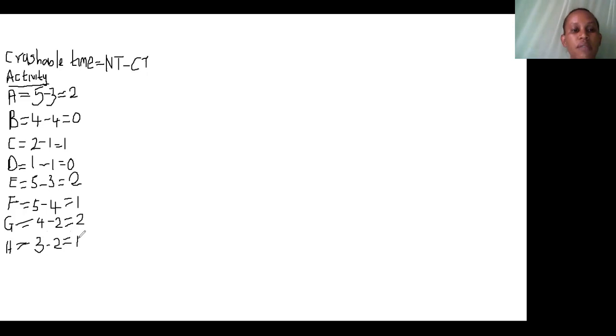The next item we need before we start our crushing process is the computation of what we call the cost slope, or the incremental cost per given unit of duration. In our case, we're talking of per week.